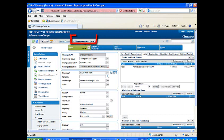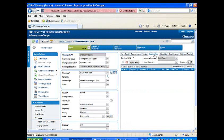To navigate back to the change request, use the breadcrumb bar. To add the affected system, click the relationships tab. If this step is not completed, your change request will be rejected.